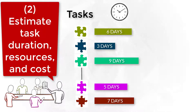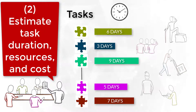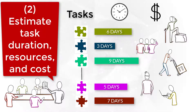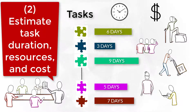Each task at the WBS lowest level is evaluated. For each one, we first try to estimate the effort work hours it will take to finish the task. Two things should be taken into consideration to determine the task duration: the effort work hours and resource availability. For instance, the project manager should understand if the person in charge of a task will be working full-time or part-time. Full-time dedication leads to a shorter duration.